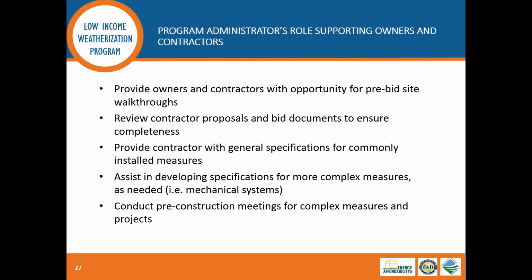And then we'll come out again at the completion of the project to make sure that the measures were installed correctly. Once we come out and verify everything looks good, then we'll go ahead and release the incentives to the building owner.